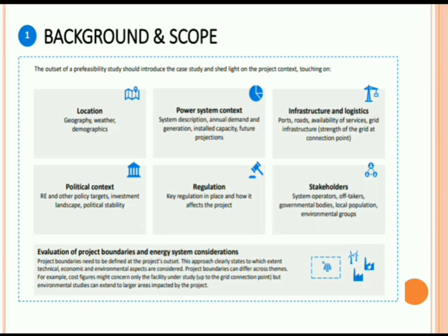Project boundaries can differ across the themes. Whatever the theme we are considering, the boundaries will be different for the different themes. For example, the cost figure might concern only the facilities that will be under study, but the environmental study can extend to the larger areas impacted by the project.